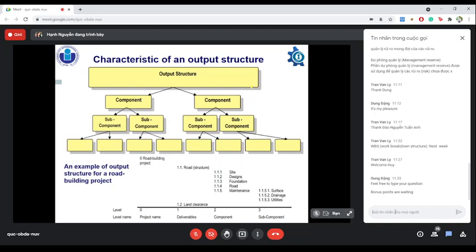So here's a characteristic of an output structure. We can see that an output structure may have many components, and each component consists of many subcomponents as well. In order to make it clear, here's an example of output structure for a road building project. With a level zero project name in this example is road building project. Two deliverables are road and land clearance. The deliverable road consists of many components like size, design, foundation, road, and maintenance. Continuously, the maintenance component also has many subcomponents like surface, drainage, and utilities. Next slide,